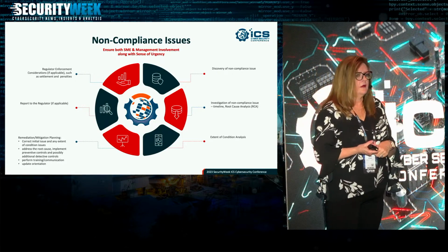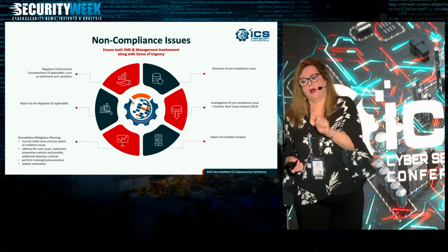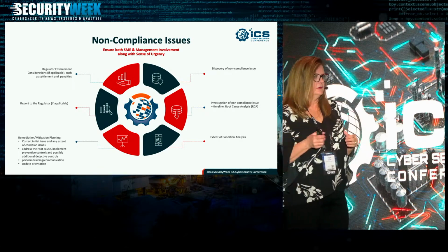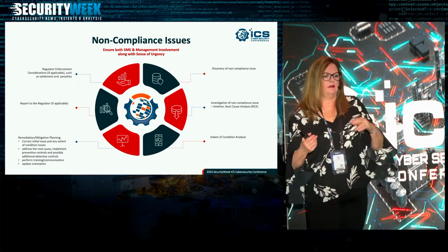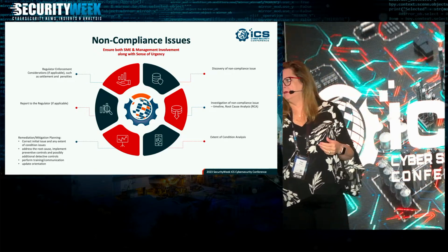We used to do one called the 5 whys. Why did this happen? Okay, then why did that happen? And so on and so forth. And if you go at least 5 levels, you can usually get to the root cause. Sometimes you might have multiple root causes.